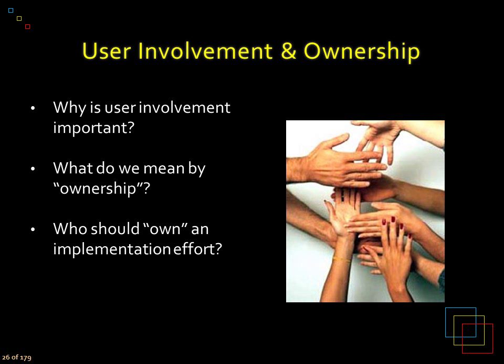When implementing a new system, it's critical to involve users and the customer, because they're the ones who have to use it. It's best to have them own the process of implementation: first, people in their organization already know and trust them, unlike you the project manager; second, they will be around much longer than you; third, if they own the implementation they will learn the new system better because they'll be compelled to teach others; fourth, they will fight for it to work smoothly and know the ins and outs of their organization, helping you avoid potholes you could not have foreseen.